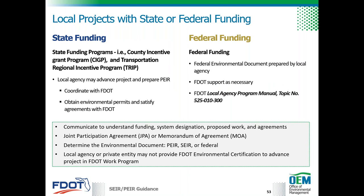A local agency may advance a project through any one of several state funding programs, such as the County Incentive Grant Program and the Transportation Regional Incentive Program. If state funds are being used, the local agency may prepare a PEER to support its acquisition of appropriate environmental permits and to satisfy other agreements with FDOT. The local agency should follow the procedures outlined in Part 1, Chapter 10 of the PD&E manual. There may also be instances when a local agency seeks to advance a project with federal highway funds, in which case a federal NEPA document would generally be prepared.